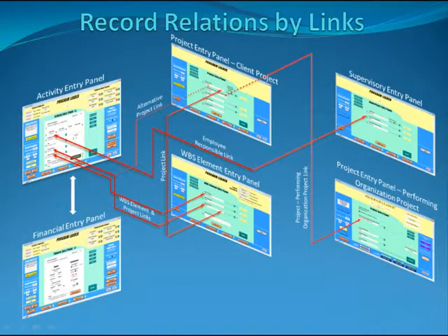The performing organization is represented in a project record designated a performing organization project. The client project has a field to link to it. Just like the client project, but not shown on the diagram, the performing organization project has its own set of WBS elements and links to its related activities.